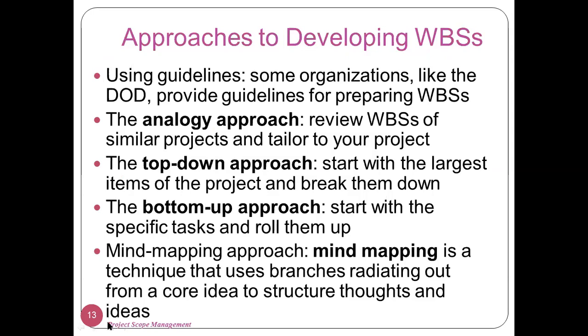In the analogy approach, we discussed that when you have similar kinds of projects, you can simply edit the previous work breakdown structure and adjust it according to your new project. But this approach can only be useful when you have a similar type of project that you have already done so far.